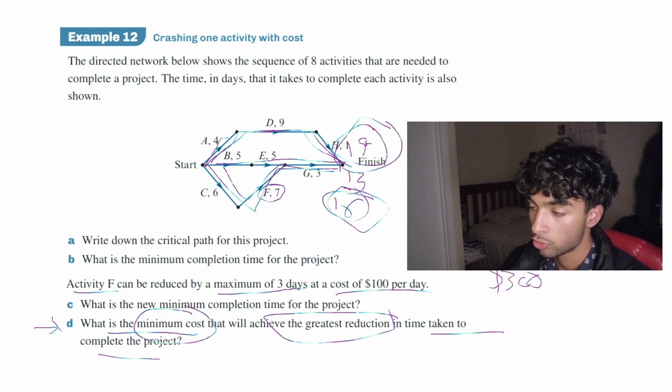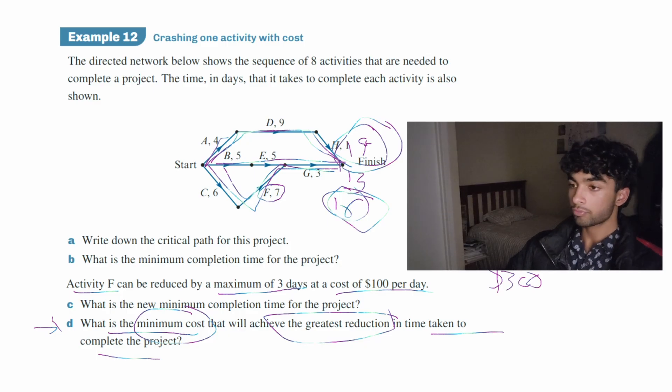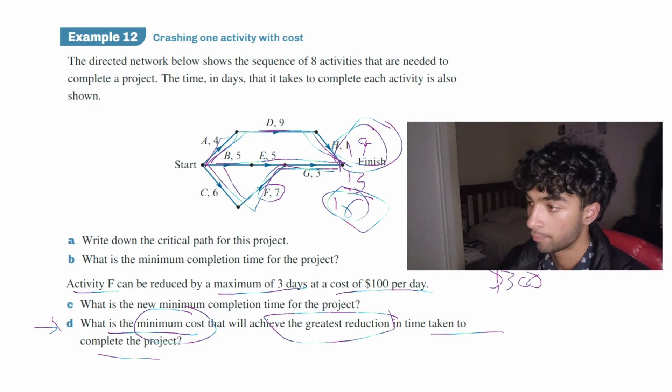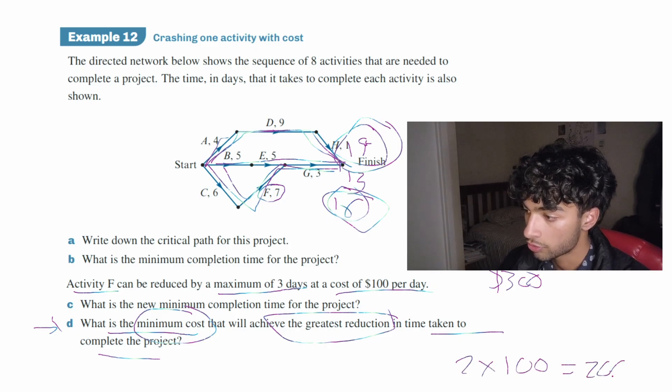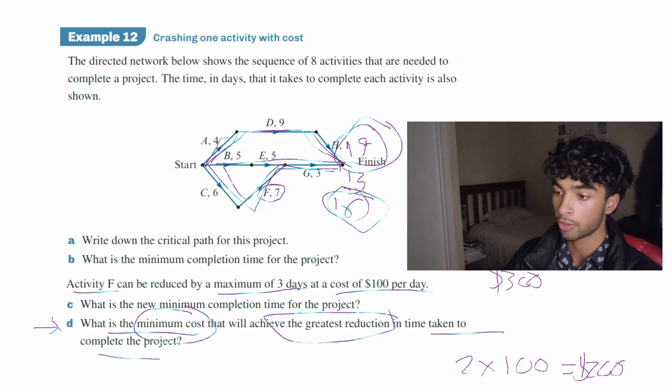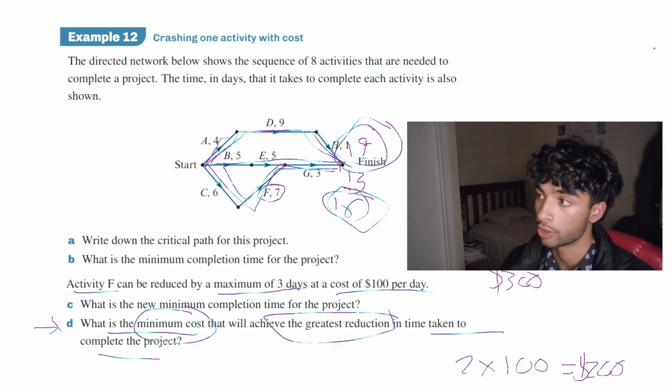So if we do two times, it will be 16 minus 2 which equals 14 and that is the maximum reduction that we could ever have. So therefore, F can be reduced twice for two days. So two times $100 equals $200. So that means the minimum cost is $200 to achieve the greatest reduction in time taken to complete the project.